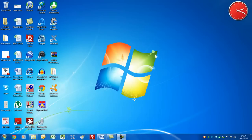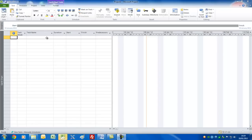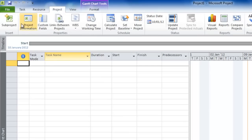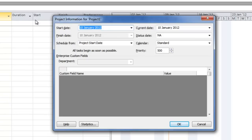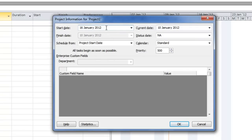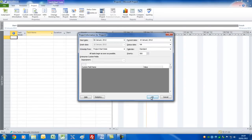I want to open up the Microsoft Project application itself. Don't forget there's an accompanying guide that you should print out and have in front of you. It'll be helpful while I go through this. The first thing you'd want to do is set up your basic project information, and for this reason we go to the Project tab and Project Information. Today's date I'm recording this is the 10th of January. What I want to do is set the start date to the 16th of January, just to show you that you can adjust this for some point in the future. So let's press OK.